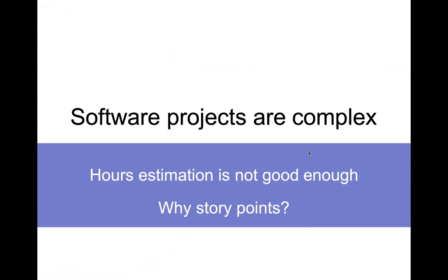The reason for this is that software projects are complex. When we are estimating, most of the time people miss some aspects of the development. So with hours, it's really tough to provide estimations as the software is complex. If the system is very small or everything is clear, then we can go ahead and take units like hours or days. But if the system is complex and we still depend on other things, then days and hours are really tough. In that case, we should always use story points.